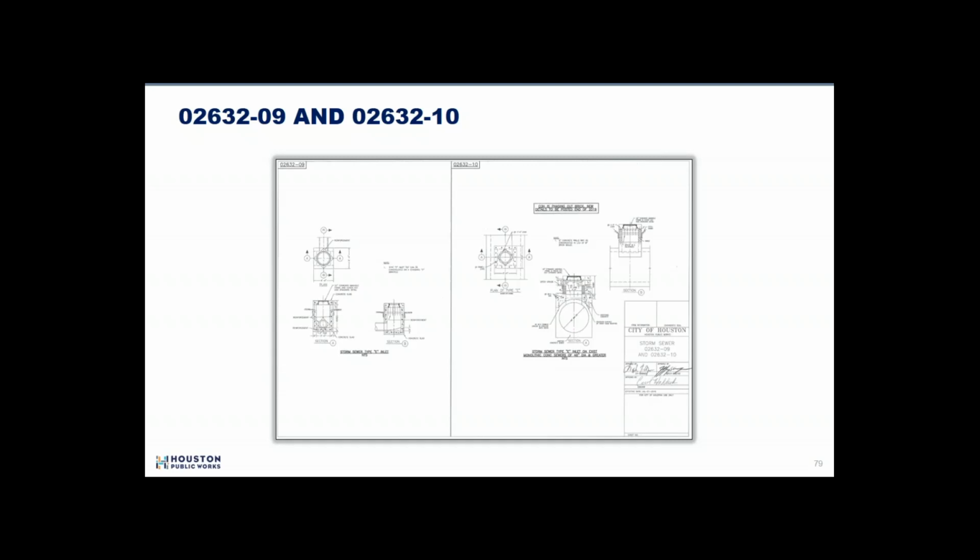We are trying to replace and add details on the storm water relations side. So one part of that, just kind of touch on that. Jamie did speak to the 700. At the table of contents conversation and the specification conversation, this is not different than any other entity that performs construction work, municipal or highway related. At the time, 700 explicitly says at the time of bid, the specifications at the time of bid are applicable.